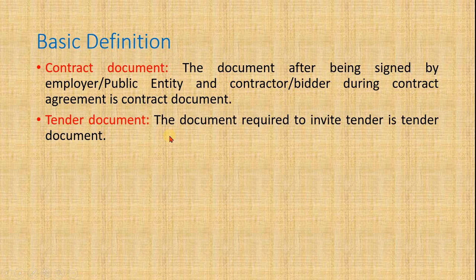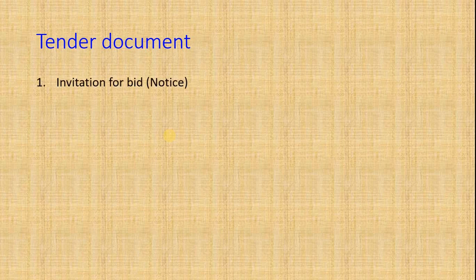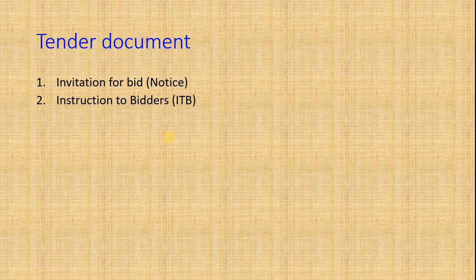Now let's see what the tender documents are in priority order. The first is the Invitation for Bid — that is the tender notice. The tender notice contains information like when the tender will open, what the amount of the tender is, what conditions apply, who is eligible to apply, how much bid bond or bid security is required, and other related information given in summary.